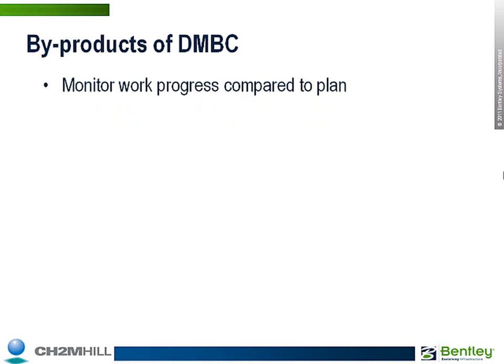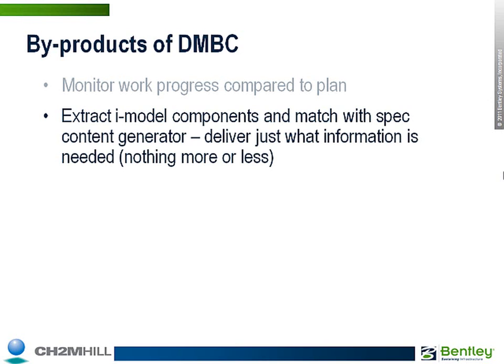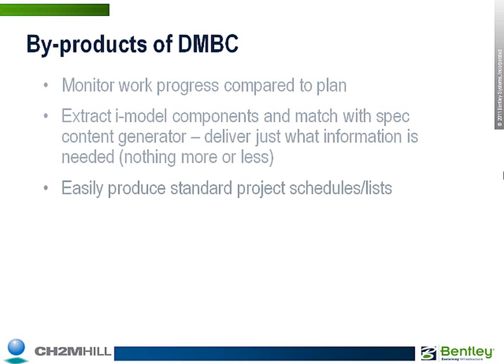We found there were beneficial byproducts of using the DMBC tool. We're able to more closely monitor design progress compared to schedule. We can extract components from an iModel and pass them on to SpecWave, which automatically generates specs only for components that exist in the iModel, resulting in both cost savings and less confusion in construction. And we have a simple process for generating standard schedules and lists.